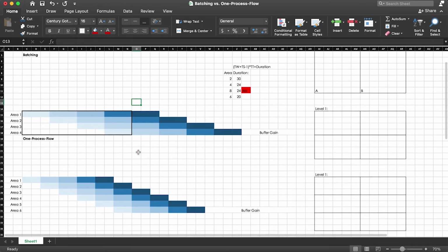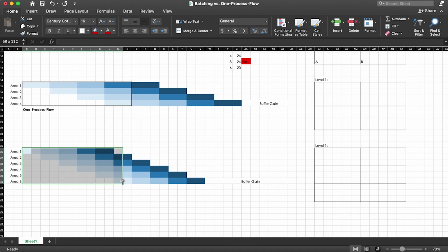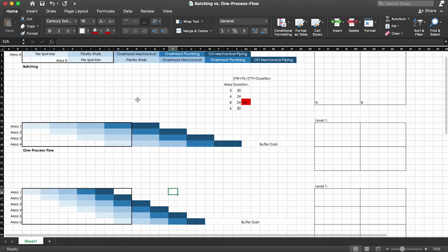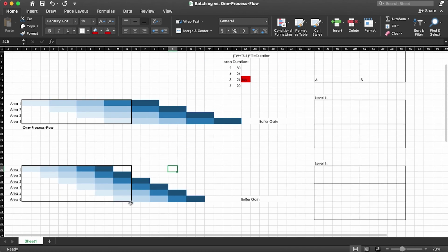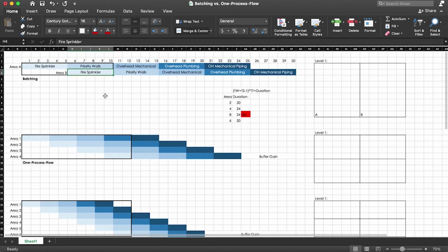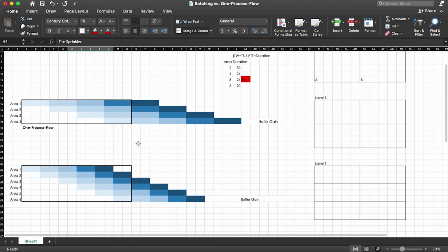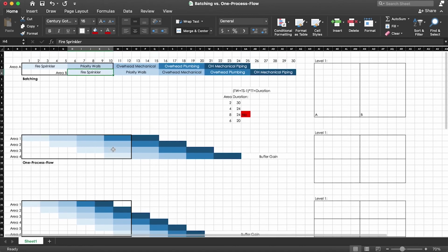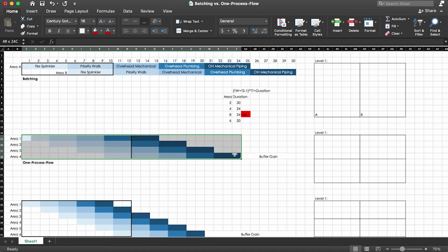They had 12 days. When we broke it down into 6 areas, how many total days do they have? Wow. They've got 12 days. Yep. They're doing really well. So they have more days than the original 2-part takt zones. And so we have to look at these optimizations in the real light of what's going on here. We have given the trade partner more time to do their work, but have taken less time overall to actually complete the work within level 1.